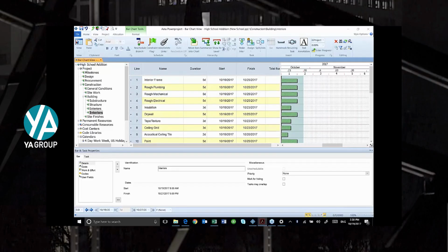Okay. Let me just show you a couple of things while we're here. In my experience, I find that the more detail you have in your outline structure, the easier it is to deal with the activities within that structure. And I read it somewhere in a report years ago, some kind of paper, that the human brain can only keep up with 6 to 9 items at one time, like keeping that kind of stuff in your memory. So I typically will try to keep activities in groups of 10 or less.